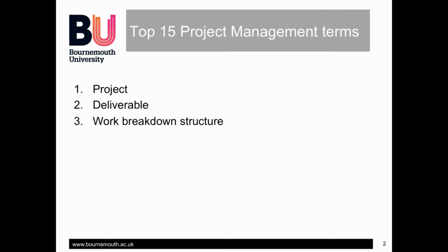For each of these elements, we then repeat the process and break down each one in turn. We continue this process until we reach the stage where we've identified all the elements of the project. If you search for work breakdown structures, you can see examples and look at the level of detail that they contain. At the lowest level of the work breakdown structure are activities or tasks.